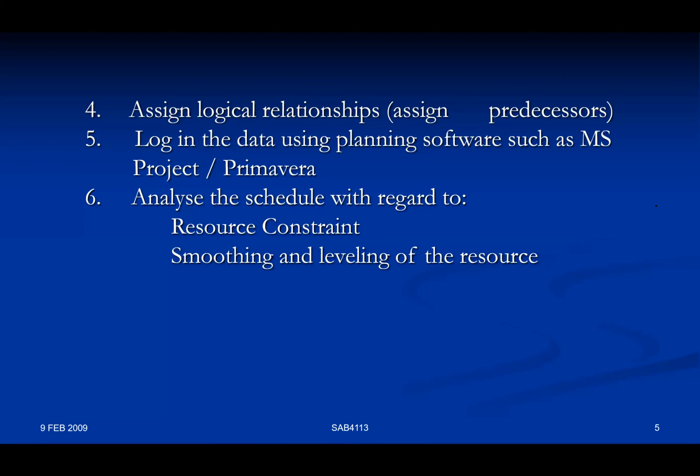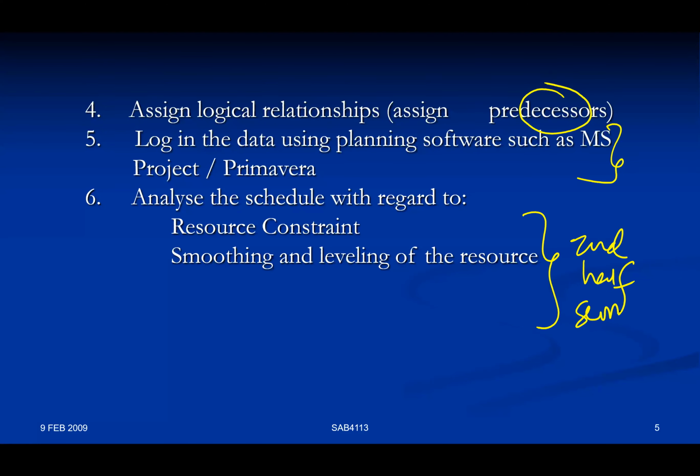Assign logical relationship, predecessor, and then log in or input your data into whatever scheduling software. Okay, analyze the schedule with regard to resource constraint, resource smoothing. This is what we are going to learn in the second half of the semester, about resource management. You notice there is terminology, resource leveling, resource smoothing, later on.